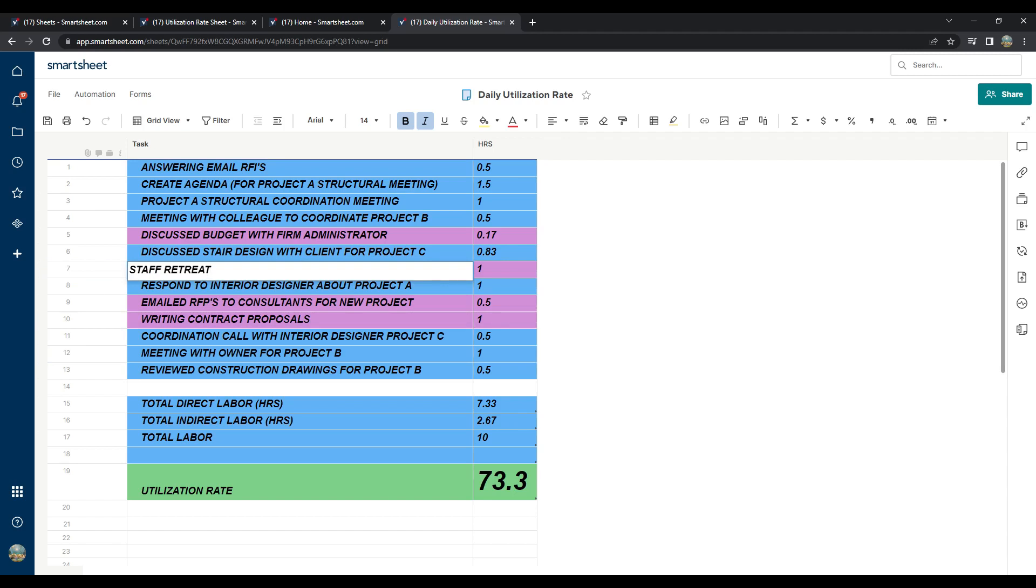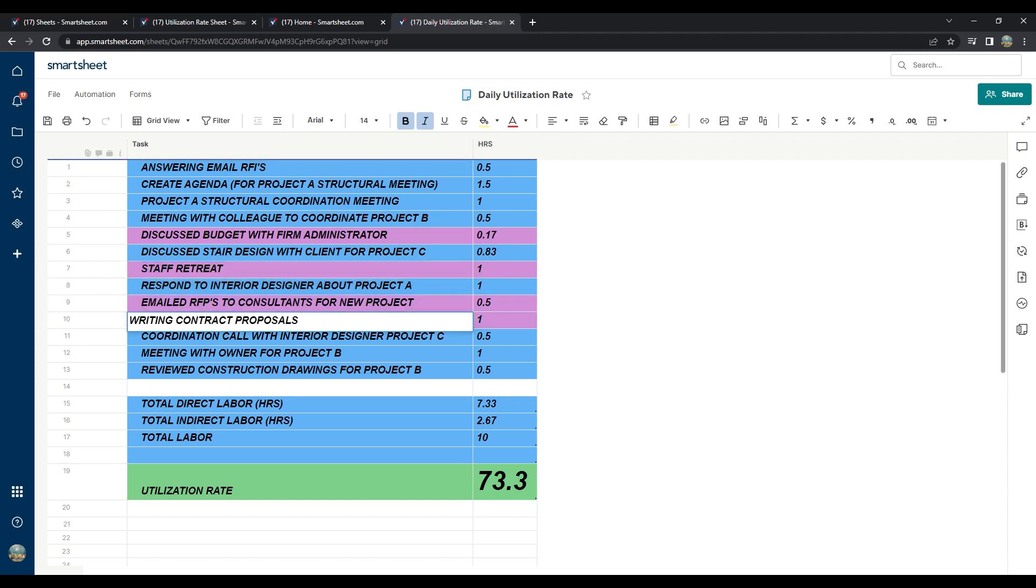What about writing contract proposals? Is that billable or non-billable? That would be non-billable because the contract is not yet signed and the project has not yet started.